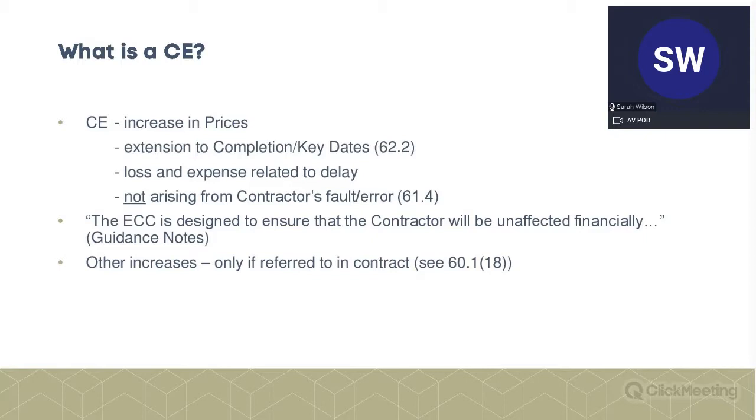So this isn't aimed at a situation where a contractor is expected to make a loss on something because it's extra work. As could happen with JCT, if, for example, the rates in the contract aren't great and those rates are analogous to variation work, then the contractor is effectively penalised because it's only entitled to claim those rates for the variation work.